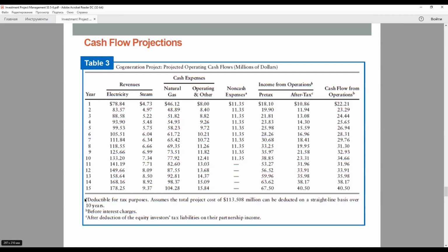Escalating revenues at a higher rate than costs will introduce a bias in favor of proceeding with the project. An economically unprofitable project may then appear to be profitable. And sometimes it is really some kind of technique, like financial modeling magic, that some analysts use when preparing the financial model.